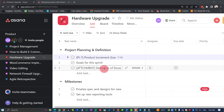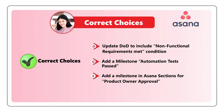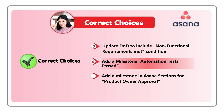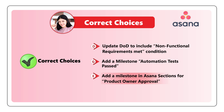Based on everything I shared, I believe the correct answers are choices D — update definition of done to include non-functional requirements met condition — choice G — add a requirement for automation tests passed — and choice E — add a milestone in Asana sections for product owner approval. Do you have a better way to solve this question? Please post your answers and rationale in comments so we can all learn.